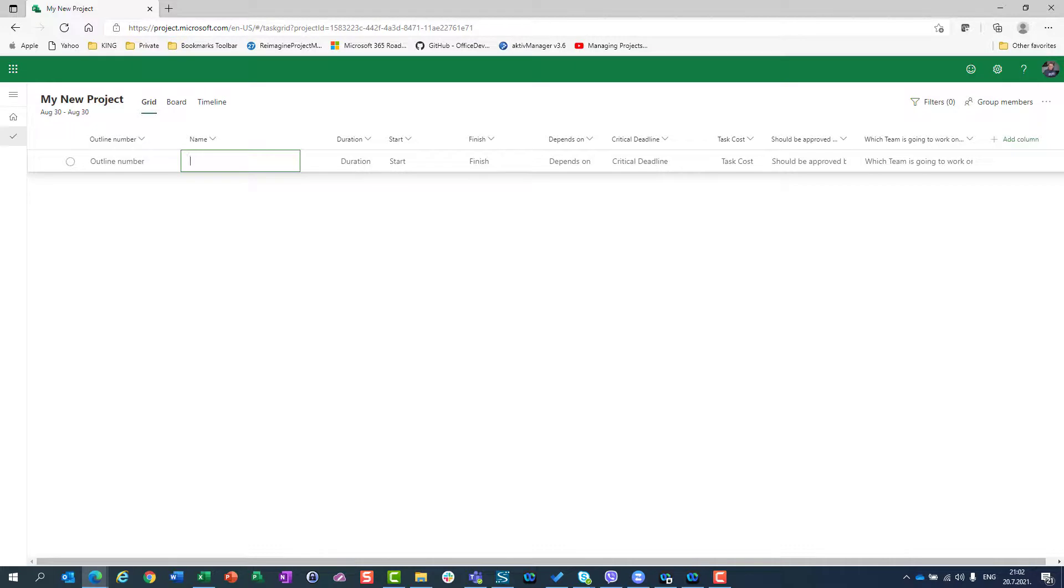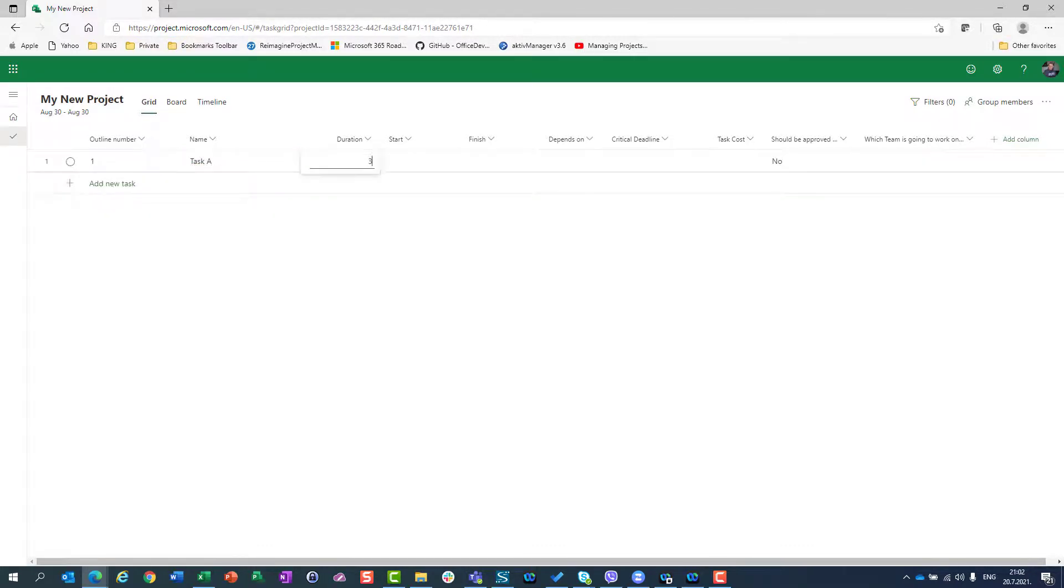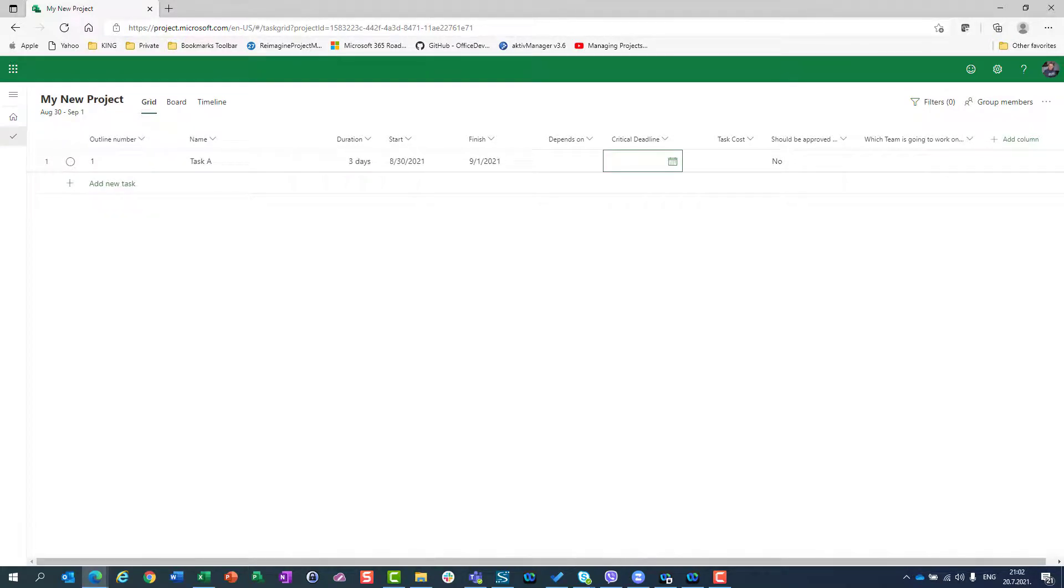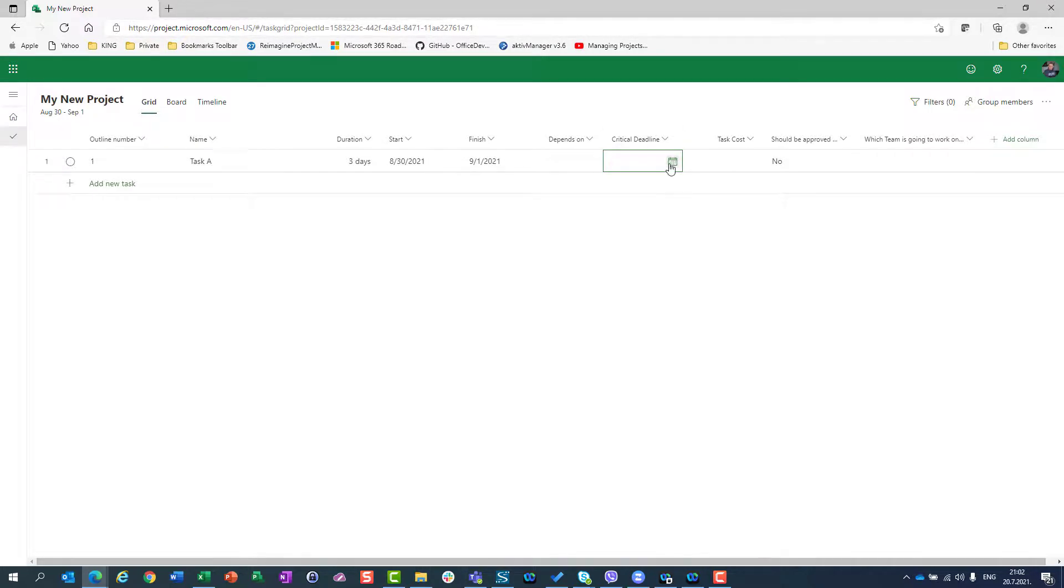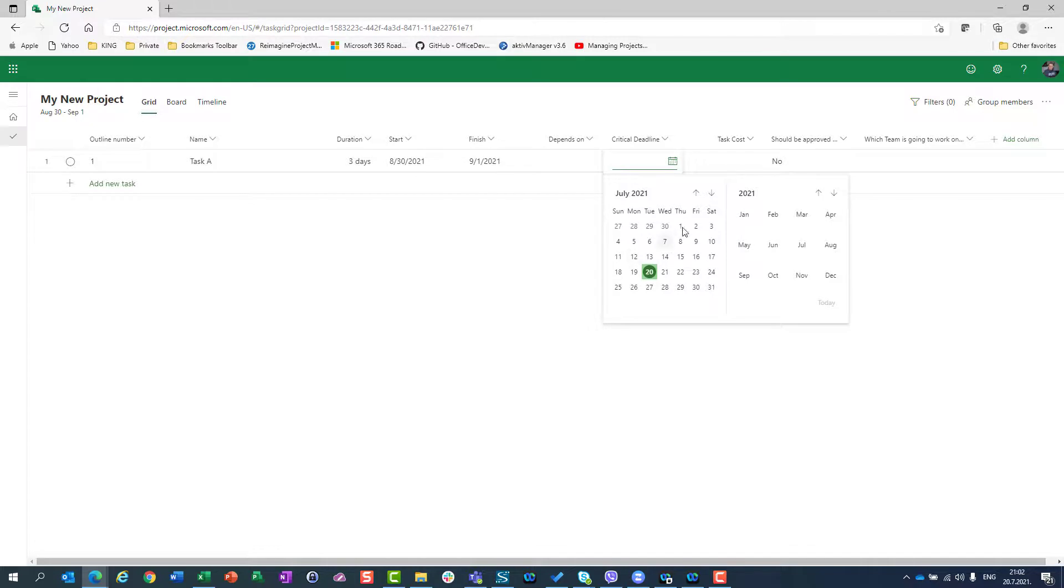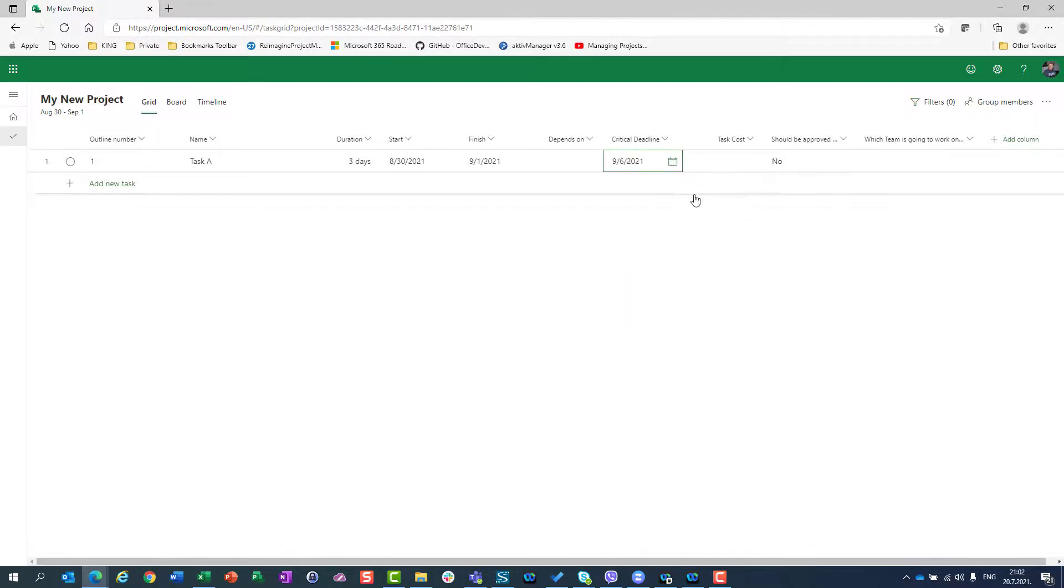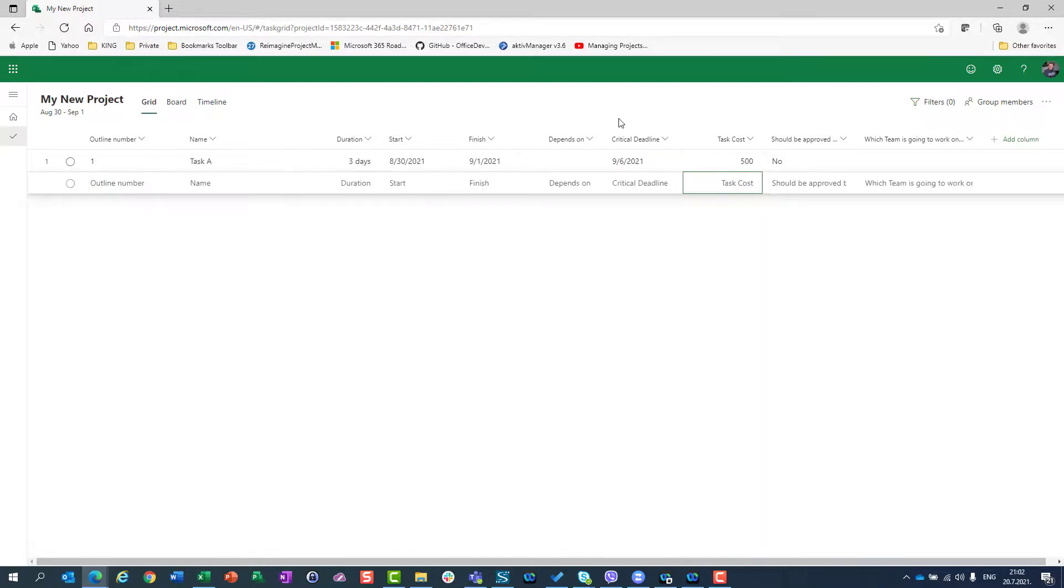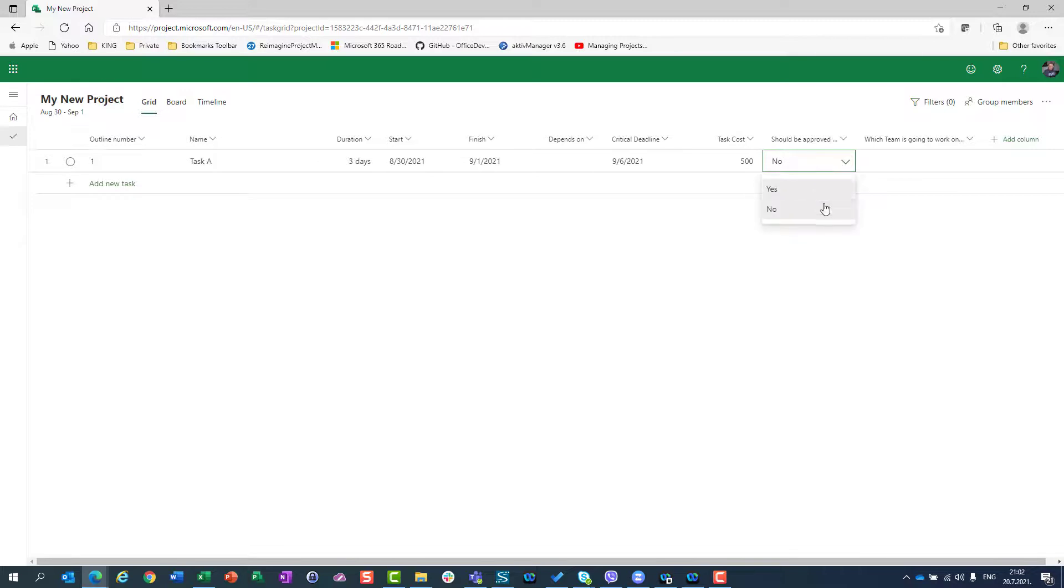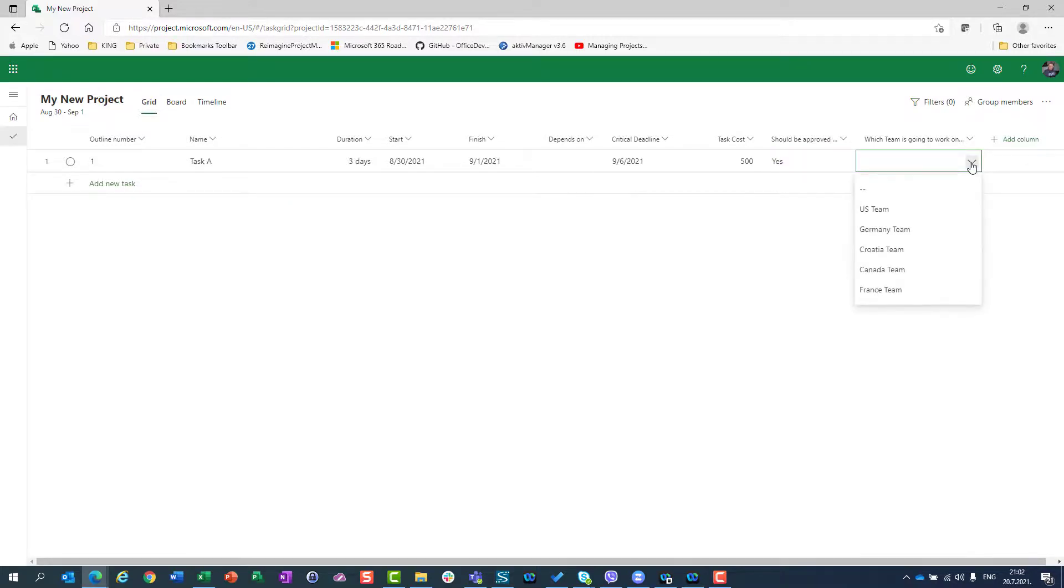I can now say task A, three days. I can set a critical deadline - 6th of September, cost of 500 US dollars, should be approved by project manager, and will be performed by Croatia team.